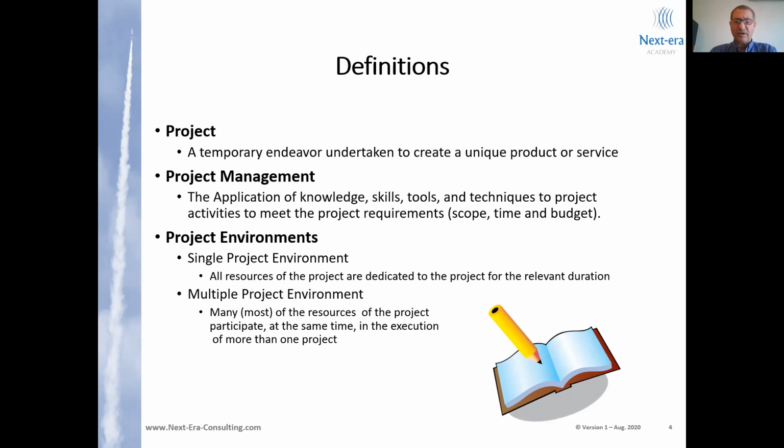There are two major project environments. We will have another session on the multiple project environment. This one is on a single project environment, typified by all resources that are executing the tasks in the project are fully dedicated to the project for the duration they are supposed to be working in the project. While in multiple project environment, the resources are shared across multiple projects simultaneously. As mentioned, this will be the content of the next session.